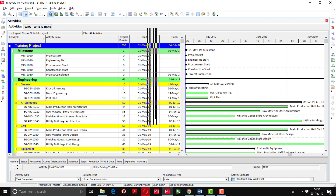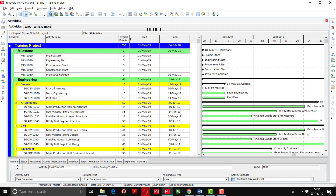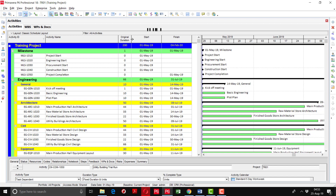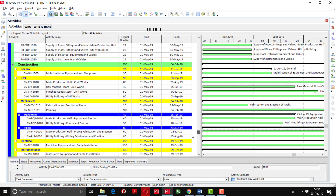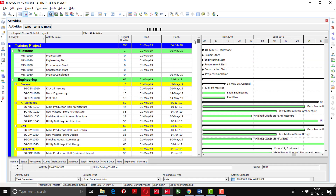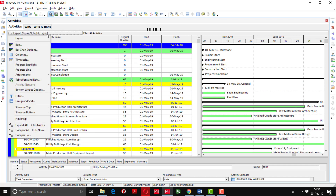Estimating activity duration is very important — it defines the number of working hours or days required to complete each task. Duration calculations depend on experience, historical data, expert judgment, quantity takeoff, and standard norms such as standard man-hours and productivity rates. Once all original durations have been defined, save the changes to the layout by clicking Layout and then Save.